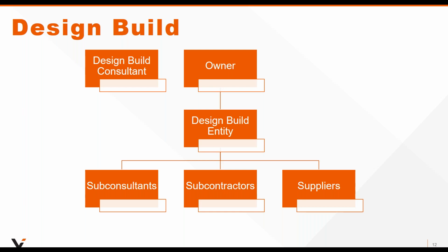The upside, obviously, for the owner is that there's a single point of responsibility for the owner. And the liability that the owner has for design is diminished. Thinking is that there are fewer changes and claims that result in less litigation between owner and contractor. And there's potentially time savings because there's only one procurement process, and you can conceivably do some fast tracking as the solution comes on board.